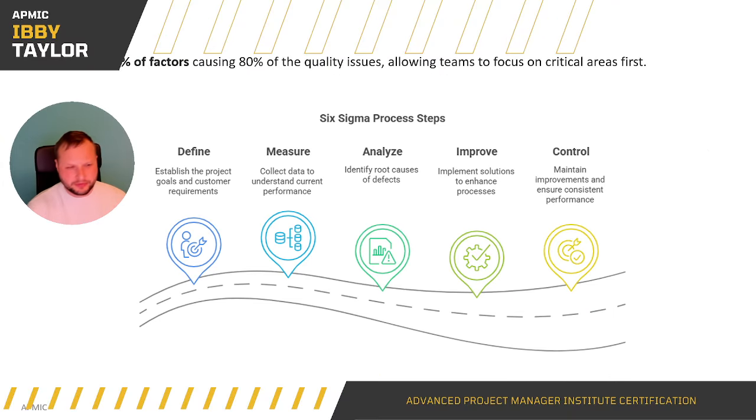And then Pareto analysis. It looks to identify the 20% of factors causing 80% of the issues. What this then does is allow you to focus resource. If you understand essentially what your big ticket items are, what can you put resource into which is going to solve the most problems? What's going to be the most cost effective and resource effective method for reducing the number of issues that you're seeing?